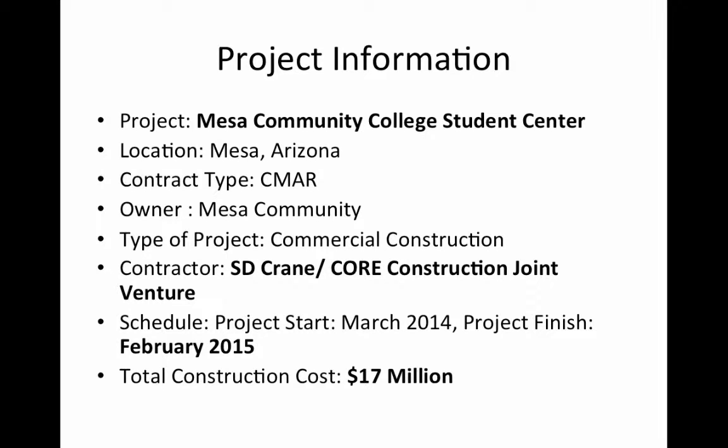Our project takes place at Mesa Community College in Mesa, Arizona. It is a joint venture between SD Crane and Core Construction. The project's start date is March 2014 and it is expected to finish by February 2015. The total budget for this project is $17 million.